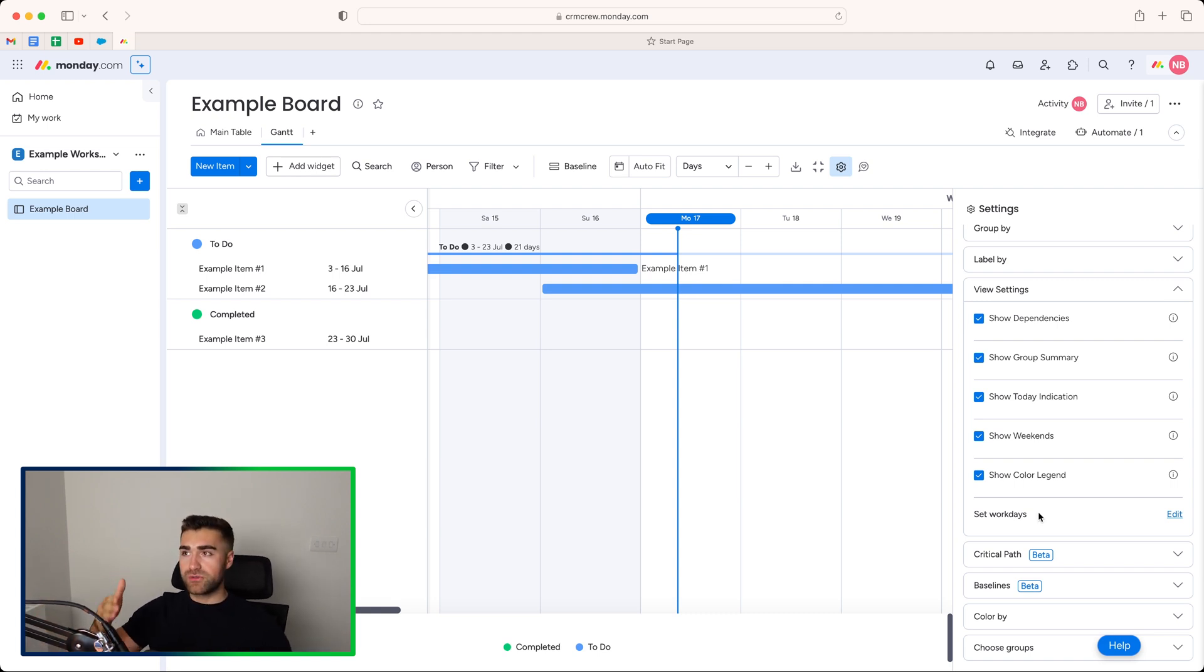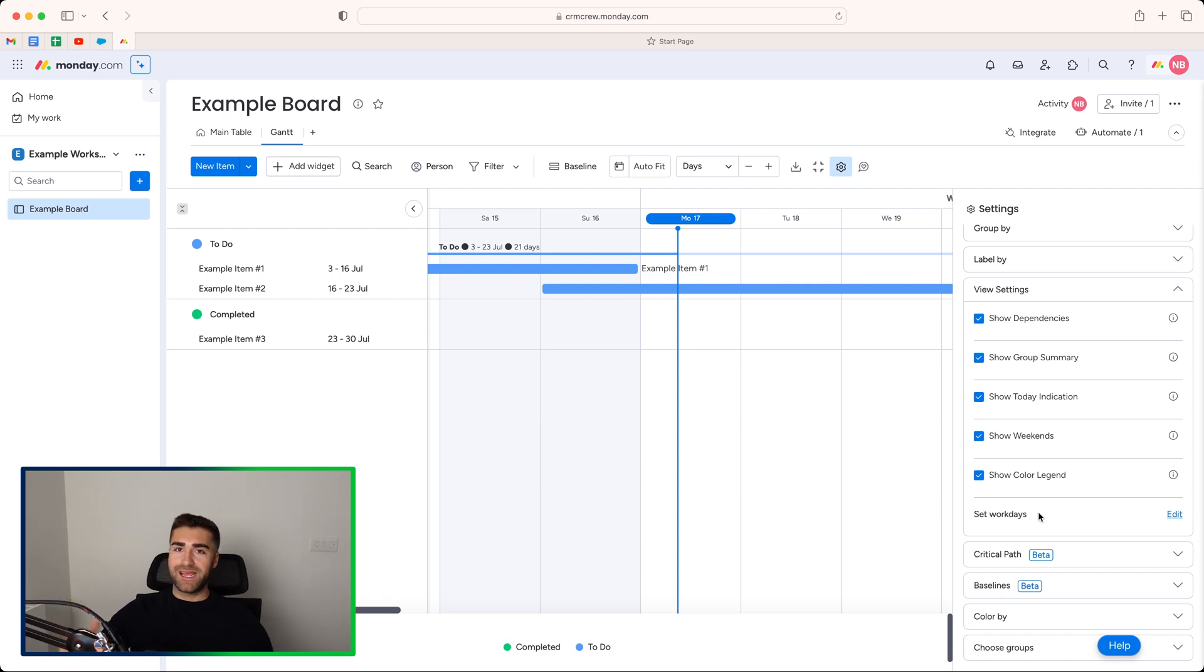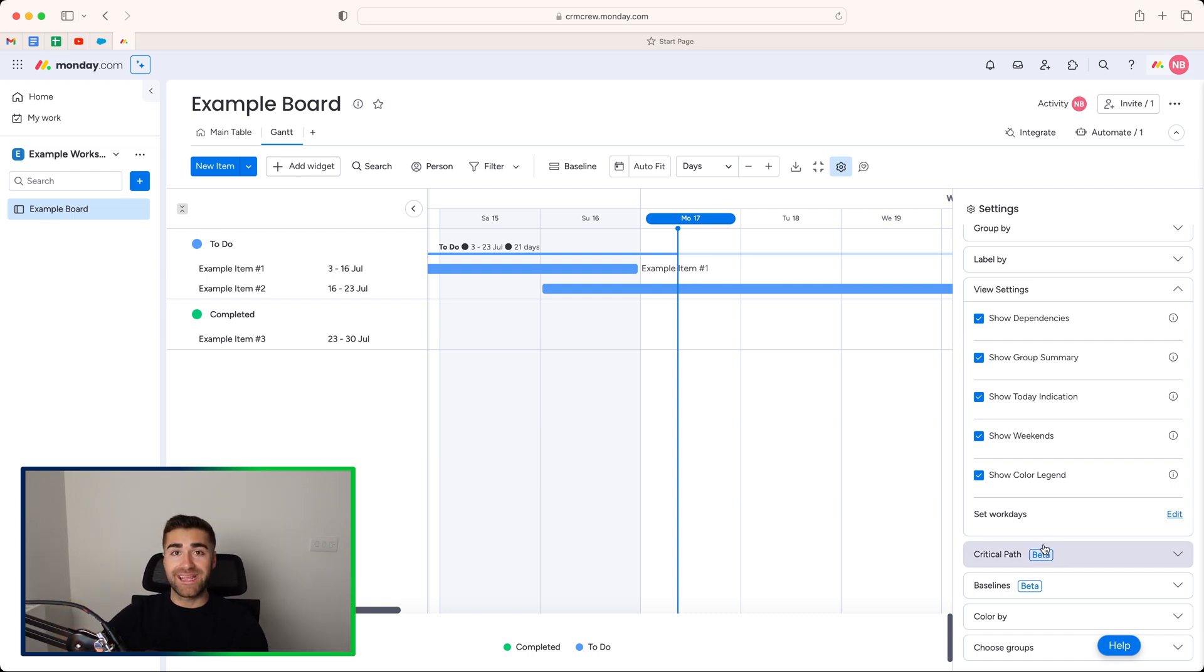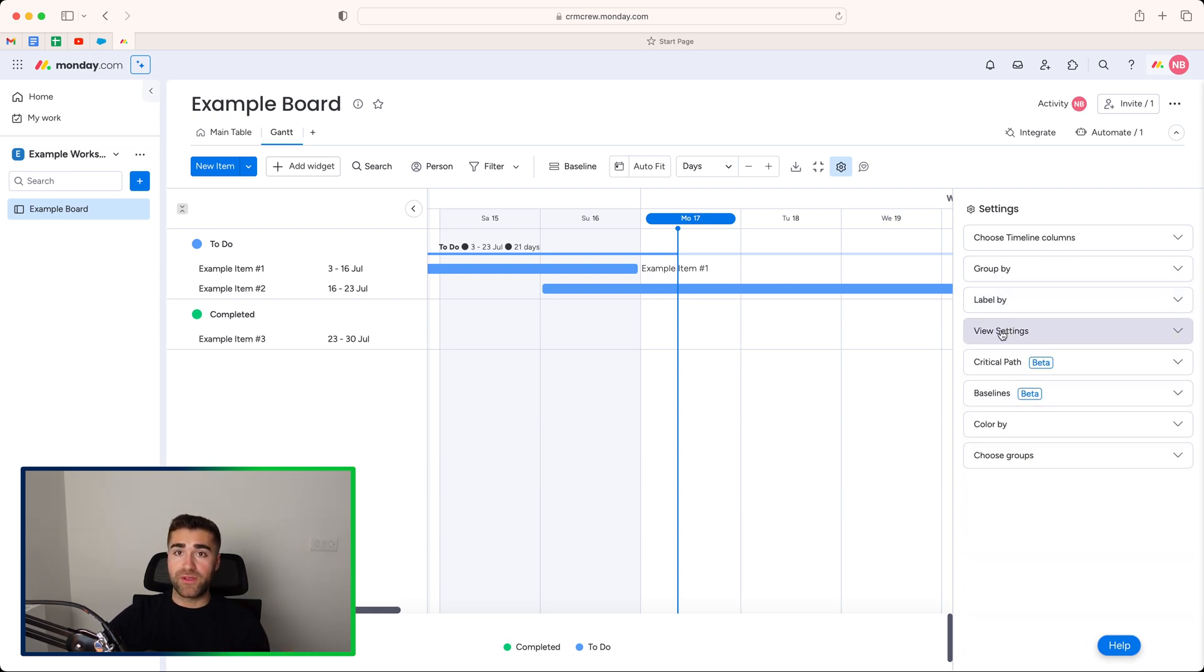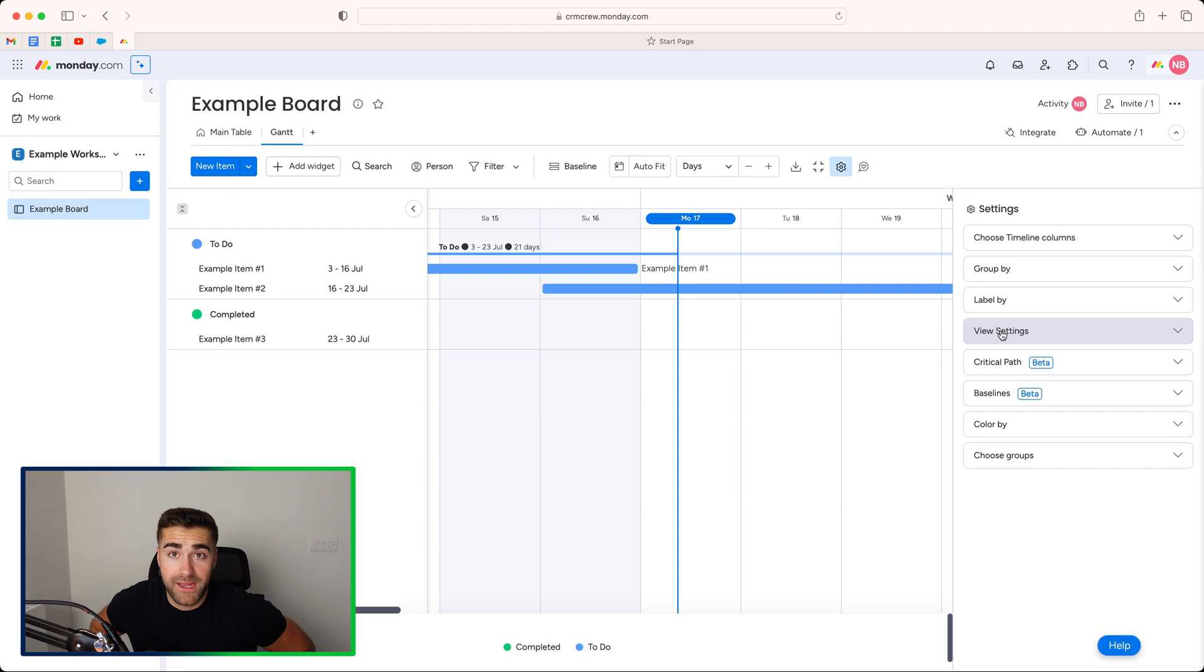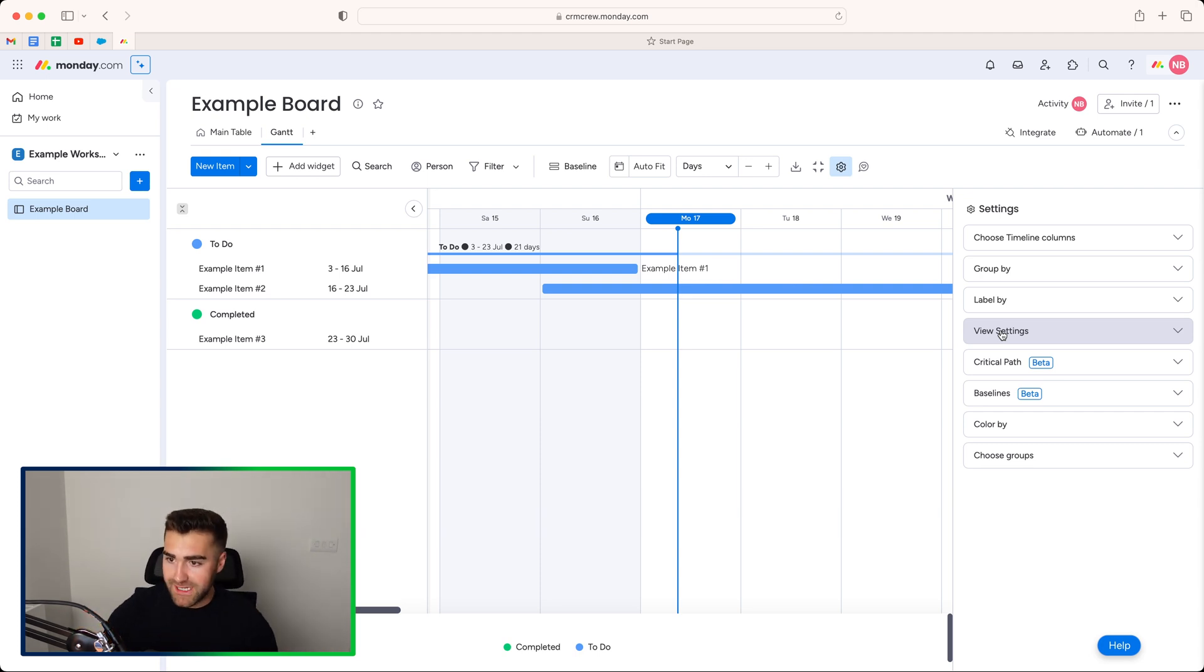And then we've got set work days. So if you work Tuesday, Wednesday, Thursday, Friday, Saturday, and have Sunday and Monday off, you can then dictate that in the system. So you can change that accordingly. Another very, very helpful feature, especially if you're running events or campaigns or you're doing something that's slightly different.